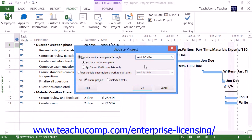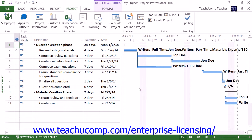Next, in the For section, you can select the Entire Project option to update all tasks in the project as of the selected date. You can then click the OK button to update the project tasks.